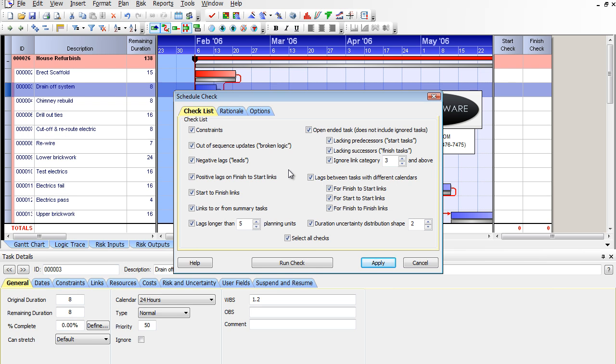My mechanical completion is 2 months from now. I'm going to do all my activities start to finish backwards so the Gantt chart looks correct. Well, when you're doing a Monte Carlo analysis, that's not going to work.